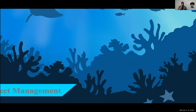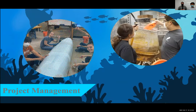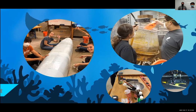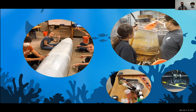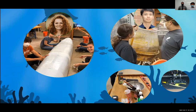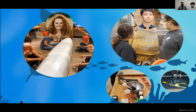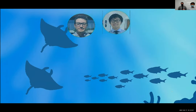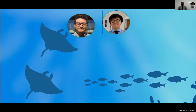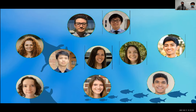In respect to project management, we break up the project into bubbles, a mix bubble, a construction bubble, etc., and allow students to cultivate the experience they want out of canoe using this system. For each of these microgroups, we appoint a lead, a student who has shown to be both knowledgeable and dedicated to lead these groups in independent meetings and decision-making. This allows captains to still have oversight of the program as a whole, but allows trusted members to commandeer vital tasks at their own pace.